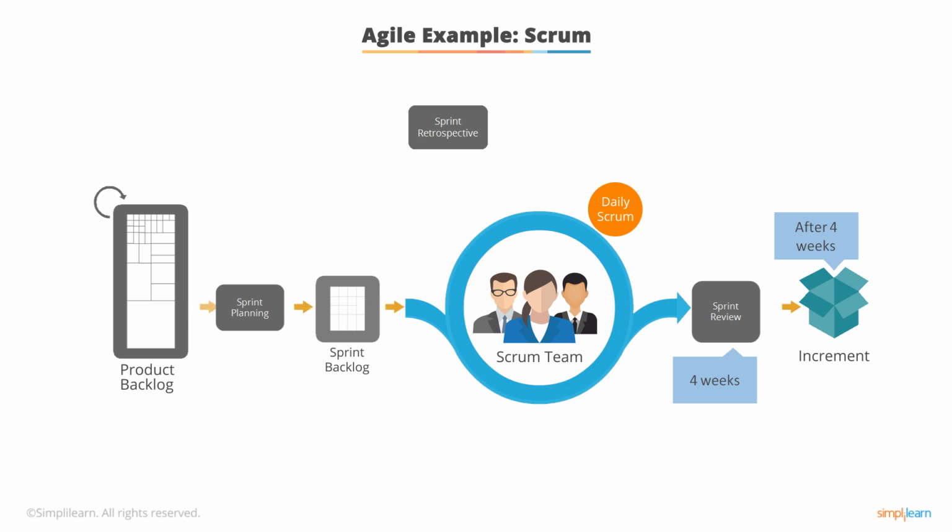And every day the teams will meet to talk about the status of the sprint. And this is really important because one of the key features of DevOps is communication. If you look at the Agile manifesto, it says really talking to people is better than specification. Not that specification isn't important, but what you want to do is get the teams talking to one another on a daily basis and hashing out any misunderstandings that might occur or offering solutions or improvements to the way things are happening. And that's good. That's what the daily stand-up does in the Scrum team.